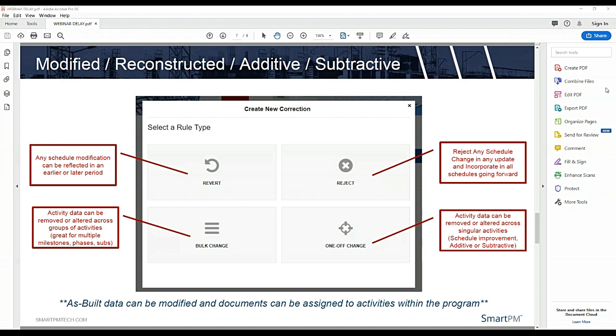And that's where we're able to go back into the schedule at any given point in time and make some decisions of our own. For instance, we can remove a logic tie, or what I see all the time is a 20-story building going up, and there not being any logic ties in the drywall, so the critical path ends up looking like a hockey stick going up the concrete and then sticking on the top floor, which isn't really true.